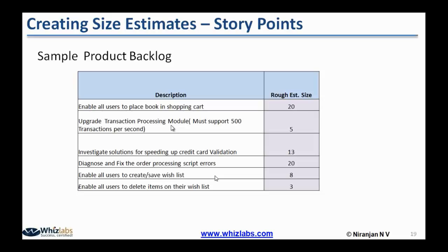Okay, 7. Mike says 7. Yeah. So that means it takes 7 sprints or 7 iterations. So then our release planning is done. If you know the product backlog size and if we know our velocity, then we can determine the number of sprints when we do release planning.